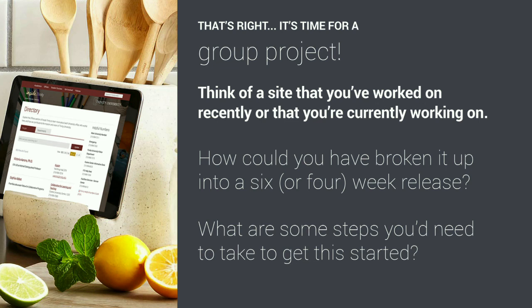One of the things that was a problem with it is they had a D6 site that they were migrating to D7, and they had a user base that had a bunch of functionality they were used to, and their user base was non-technical the same way that cavemen are non-technical. So they couldn't deal with change. Buttons in different places, they were very confused. And the original site architecture was very convoluted and not very functional. So we tried to basically redesign the whole thing in one big swoop and say, hey, here it is, it's all better. The problem was we would make architectural changes that were intelligent and made things more stable, but you know the button was 3 pixels too far to the left and nobody could figure it out anymore. And they couldn't see the new functionality partway through, so they would just freak out because the wireframes were weird.